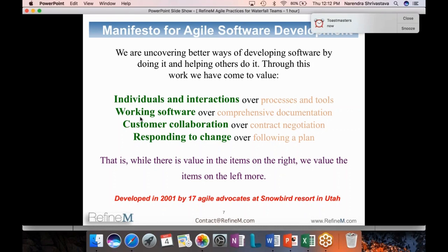Actually, in Agile you spend more time in planning than in Waterfall. In Waterfall, you do planning once and then you probably just update your plans. In Agile, you do planning in every iteration, every sprint. You don't do upfront planning for the entire project, but you do planning at different levels. You create a product plan, a roadmap, release plans, and then in every release you do sprint plans. So you do lots and lots of planning.